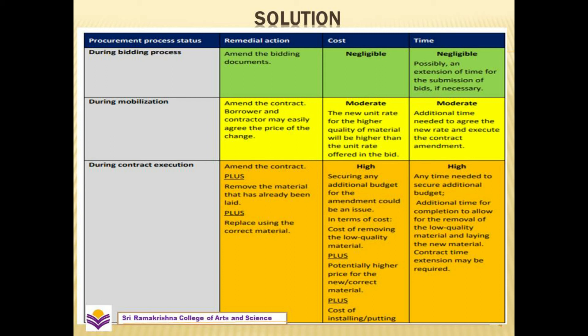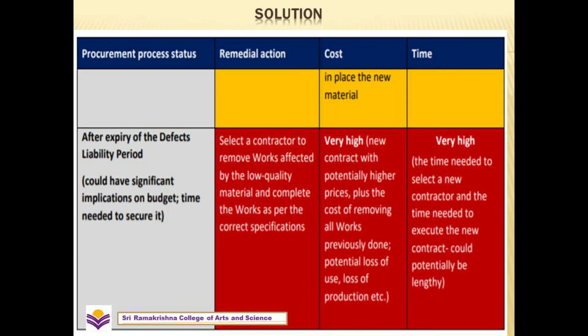During mobilization, amend the contract — cost and time are moderate. During the contract execution period, amend the contract plus remove already-laid material and replace with correct material — cost and time required are very high. At the final stage of the procurement process, the remedial action is to select a new contract to remove works affected by low quality material and complete the works. The cost and time are also very high.